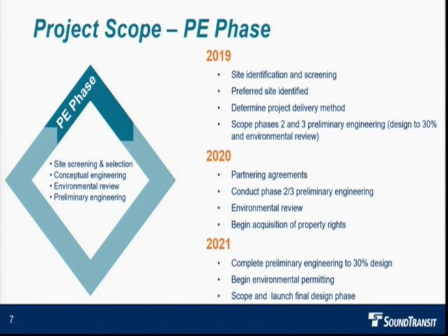So just a little bit of a zoom in on what that looks like for this year and the coming couple of years. We are solidly in the middle of our phase 1 preliminary engineering, which is site identification, screening, and selection. We hope to have a preferred site identified by the end of the summer, and we'll be coming back to you later, and Ariel will get to that at the end of our presentation where we expect to engage with the council in the coming months.